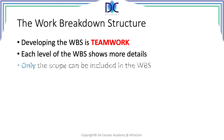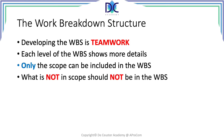Each level contains more details about the project. You can create a WBS for every project, but it's very important that the things you include in the WBS are only related to the scope — the work that has to be done to complete the project. That should be the only content in the Work Breakdown Structure. What is not in the scope should not be in the WBS.